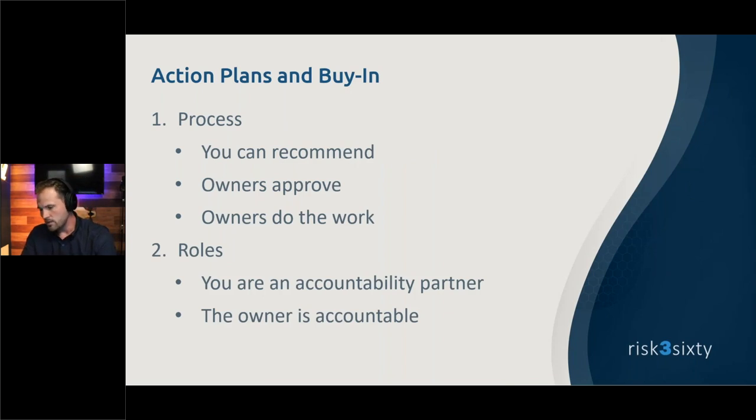Once you've prioritized those gaps, you want to build action plans and get buy-in. What I see a lot of security practitioners do is write the recommendations in the action plans. For example, the gap is we don't have security policies, and the action plan is we'll write security policies by end of year. Often the step that gets skipped is the person who actually needs to write them.